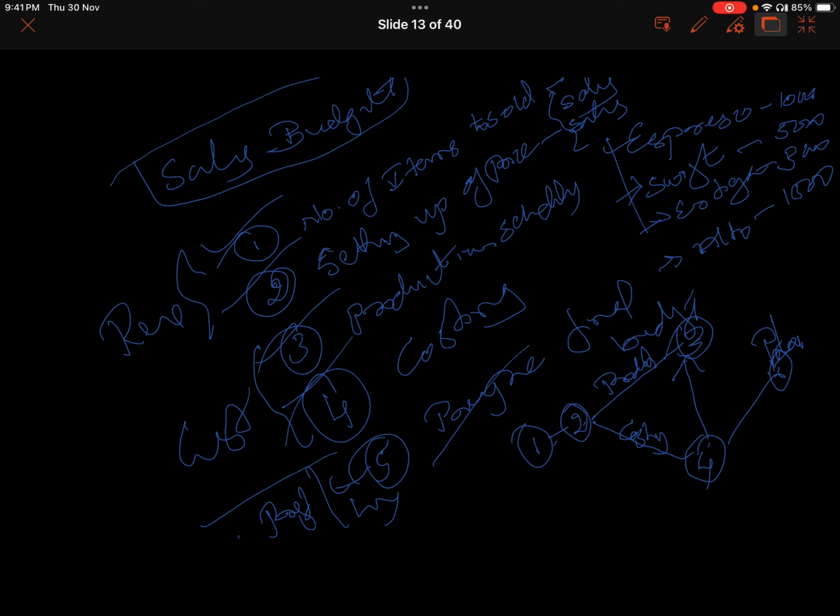When we do this kind of process, it is like a network diagram. Many processes are connected, and with this we will come to know which path, like 1 2 3 4 5 or 1 2 4 5, will take a longer time, and that is the overall project timeline.